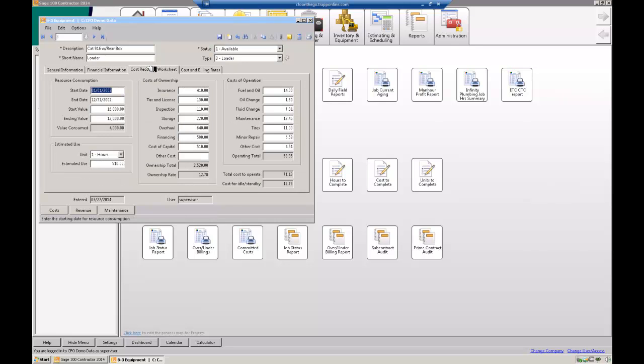This is kind of a complicated deal, but it's very useful. It allows you to enter in some fixed costs and values for the equipment, along with, and this is the guess here, the number of hours that you estimate the job will actually pay for that piece of equipment to be on the job. These numbers in the far right, your equipment guy can come up with these. They usually come out of the handbooks that come with the piece of equipment.